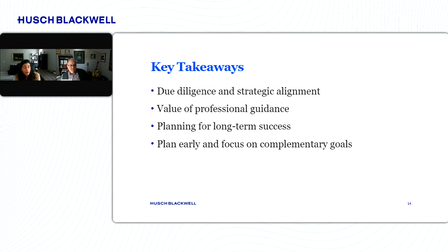A really helpful tool as well is to work backwards, so that you know how early you need to start getting your house in order. It's always nice to have a clean house to start and have everything done properly and appropriately. But if you want to sell in potentially two years from now, start thinking about when that means you need to get your financial statements together, start taking stock of your operational efficiencies, all of those things. So work backwards, and that'll help you figure out when you need to get started.